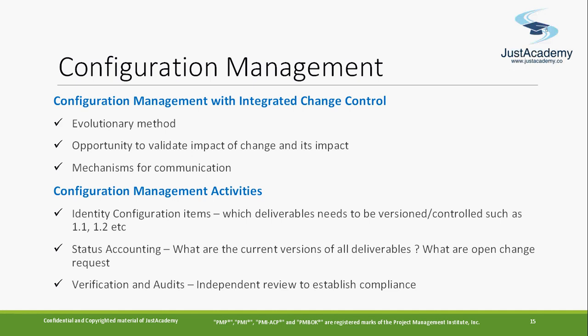Now, whenever a new change comes, you identify which item you want to change. Suppose they are asking to change the chip from this to this, as a change request. Before doing the change, you verify whether, if I do the change, it is compatible with other items on the motherboard. Is it going to support it or not? If it is going to support it, perfect, then you go ahead and accept it and document it. You're changing this from this to this as part of the configuration log. There will be a log.